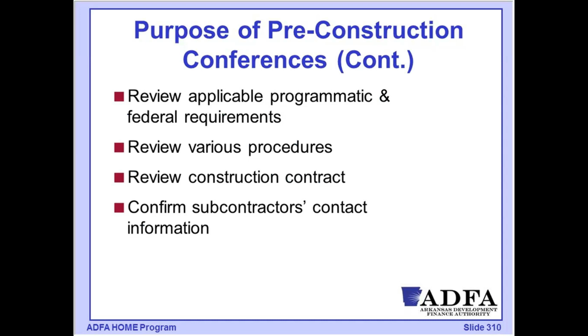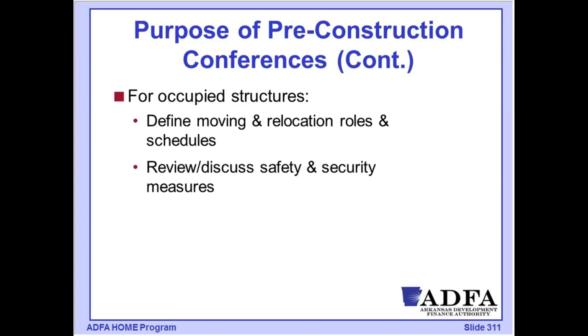Your construction contract would, of course, reference the scope of work and many of these elements. That's going to be your enforcement document. So as part of that pre-construction conference, you would want to review the elements of that contract, and also make sure that the subcontractors have been identified and that we have contact information for them as much as possible. If they can participate in that pre-construction meeting, that will be of a benefit.